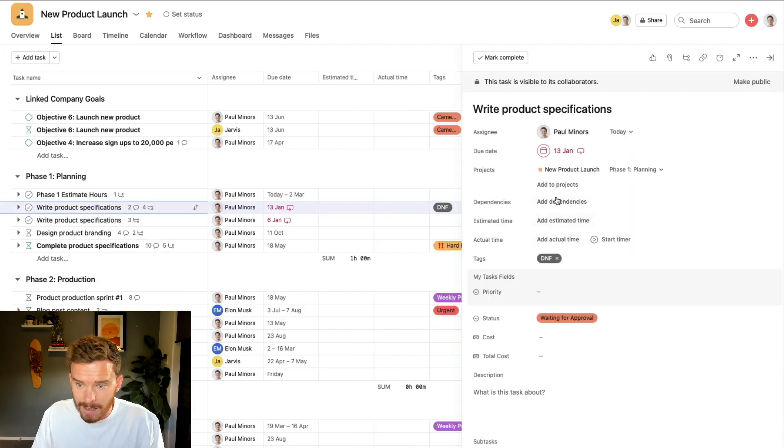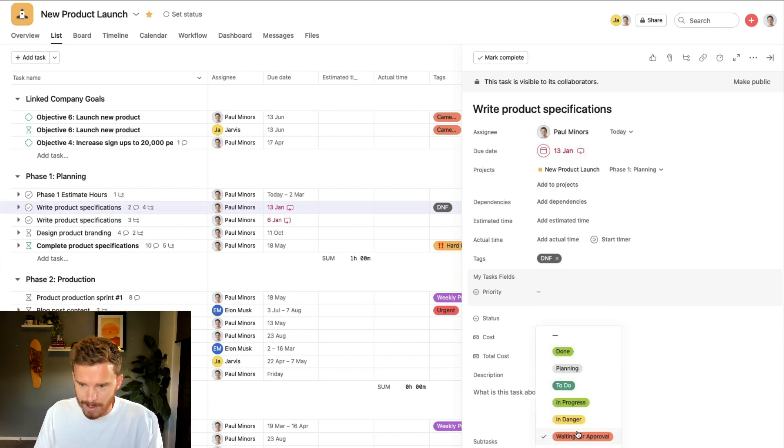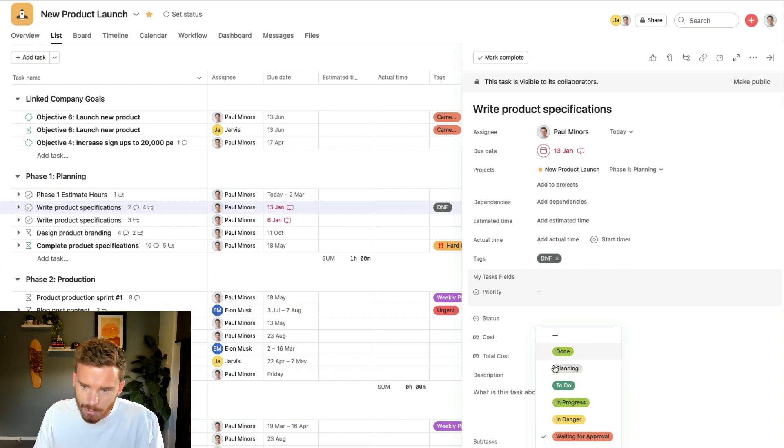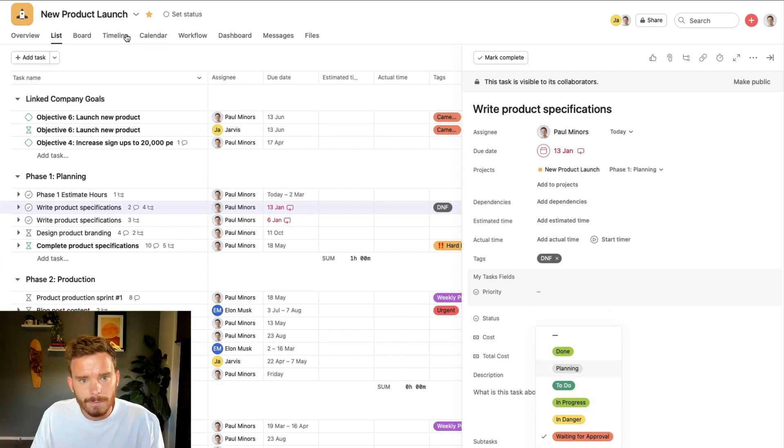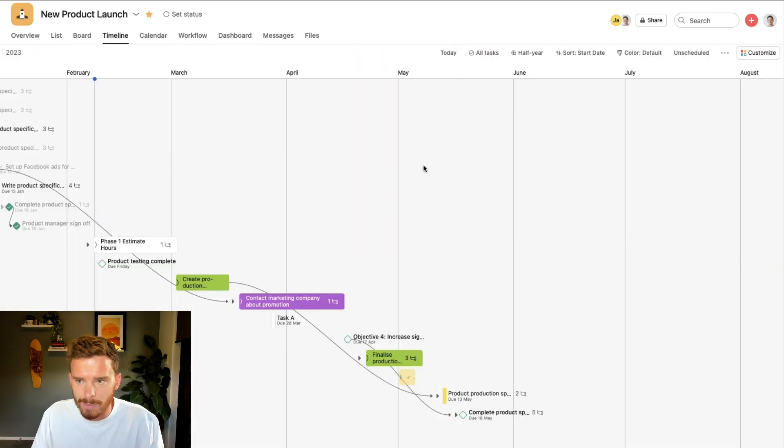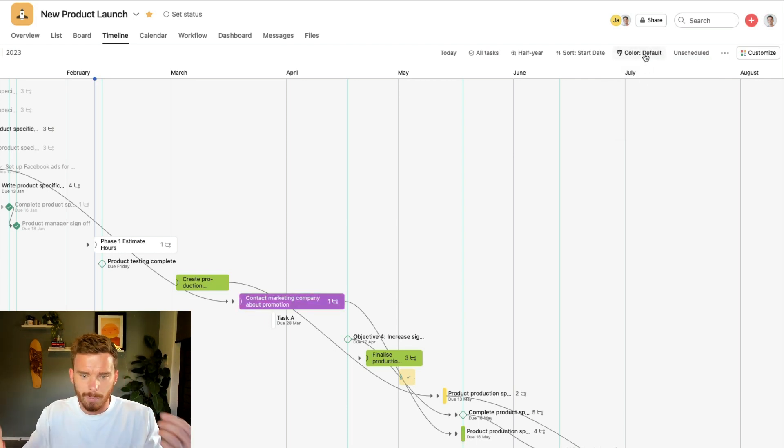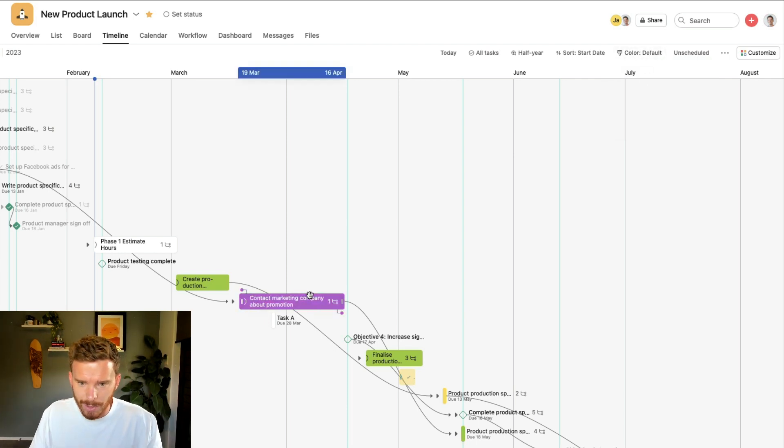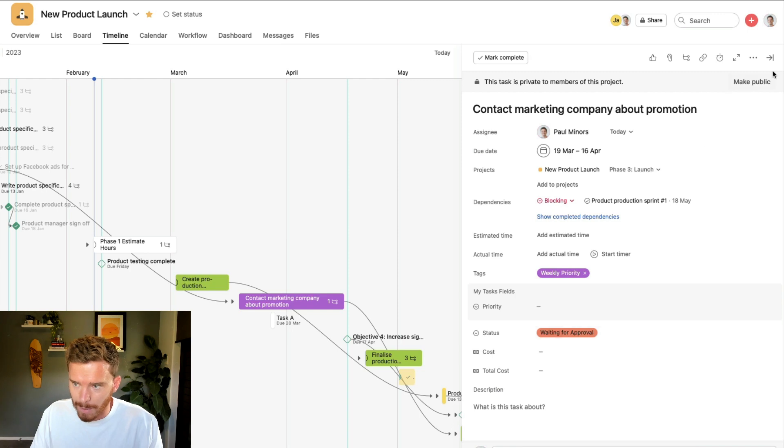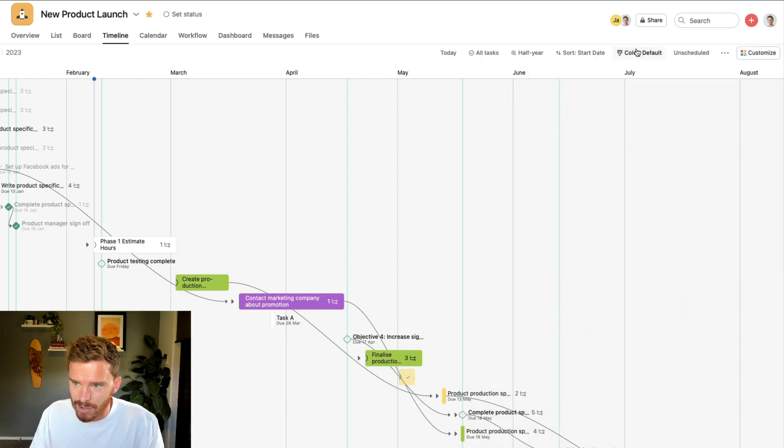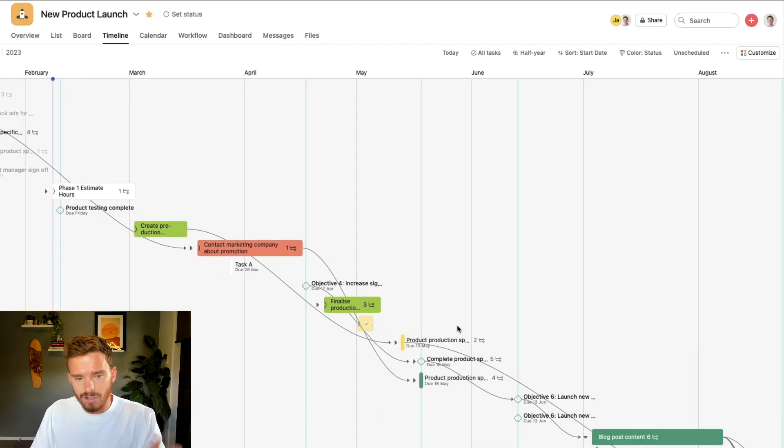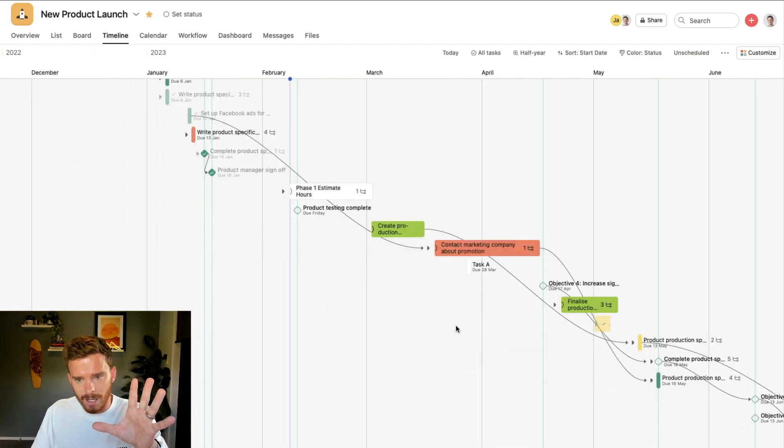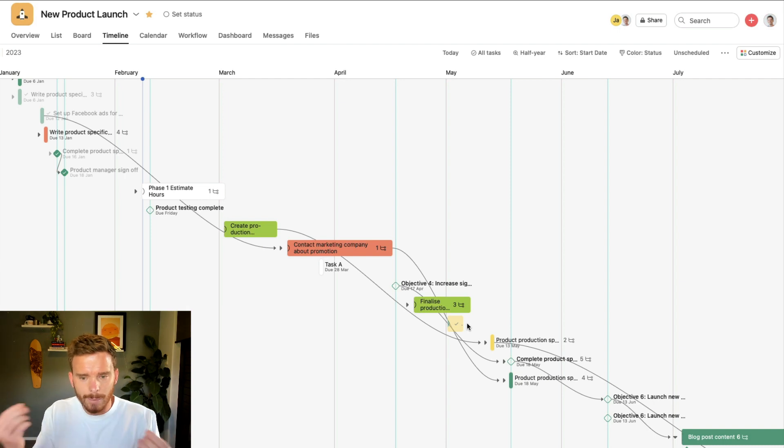If I just go to my list view for a second, if I click on one of these tasks, you'll see I have a custom field for status here. And I can see the status of the task done, planning to do, in progress, in danger, waiting for approval and behind. So green is kind of good, yellow, orange and red, not good. And so now when I go to my timeline, if I apply my status, I'm actually going to use the status custom field. I'll save my layout. And so when I look at the tasks, the color will indicate to me the status of that task. So I get a little bit more meaning on my timeline.